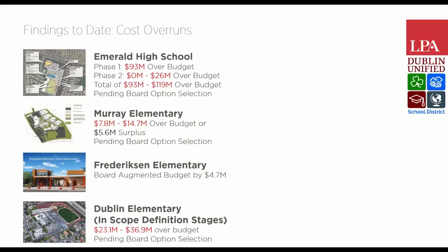Here's another question. Has construction stopped on the Emerald High School project? What is the current status with respect to the timeline given the shortfall? Thomas, do you want to answer that one? Yeah, construction has not stopped at Emerald High School. Right now, we are toward the end of increment 1. Phase 1 at the high school was divided into 3 increments. Increment 1 is underway; that's mostly underground work and utility infrastructure.